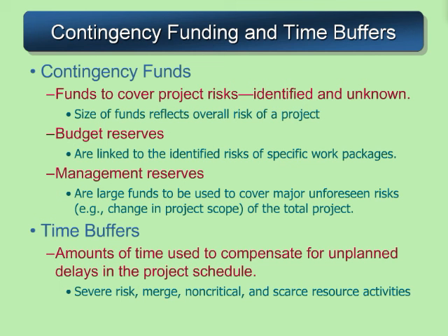And then above and beyond that, we can have management reserves in place. There are large funds that cope for major unforeseen risks, like a change in a project scope, an unforeseen event such as a Katrina hurricane type event. So those types of things are above and beyond what you can manage and really go and get into the nitty-gritties of understanding how we can overcome those types of issues. So we have some factor that we apply for management reserves.